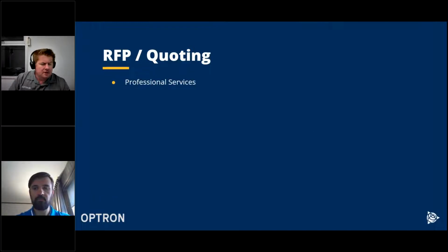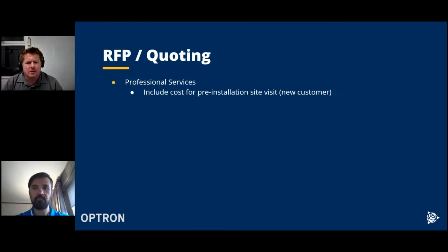Okay, so then we also need to look at the professional services that need to be offered. First of all, it's always a good idea, if it's a new customer, to include the cost for a pre-installation site visit. Preferably, you actually want to do this site visit even before you provide your final quotation. The reason for this is that during this site visit, you can clear up a lot of the items that we discussed in the previous slide, and the customer will also be much more aware of what will need to happen on site. And sometimes we can also make recommendations of exactly where to place the monitoring stations.